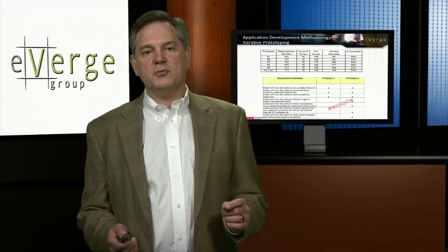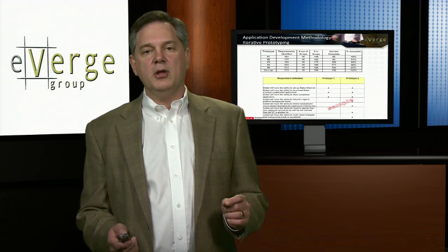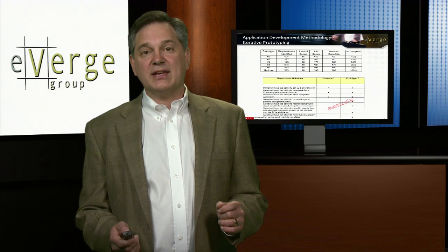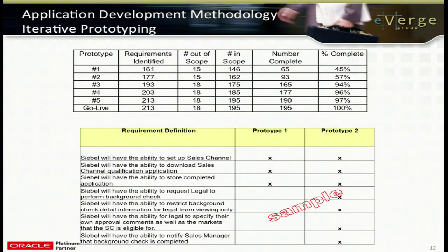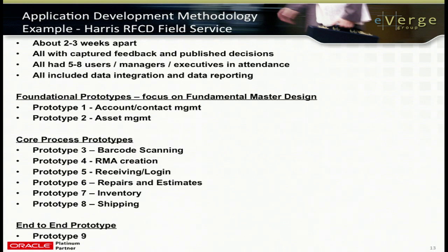Now, another thing we like to cover at the beginning of every prototype is in the second table, and this is an excerpt from one of our CRM clients. You can see we like to kick off these prototype meetings with a handout that shows every single requirement that's been documented thus far, and whether this particular requirement has been fulfilled in this particular prototype. Again, the concept is you see the application develop before your eyes.